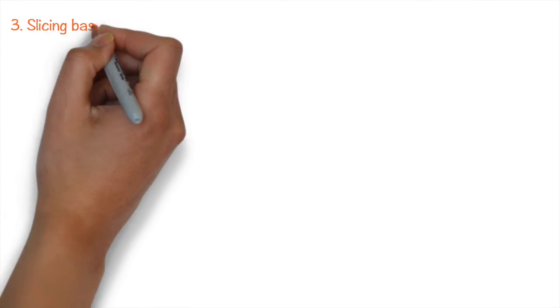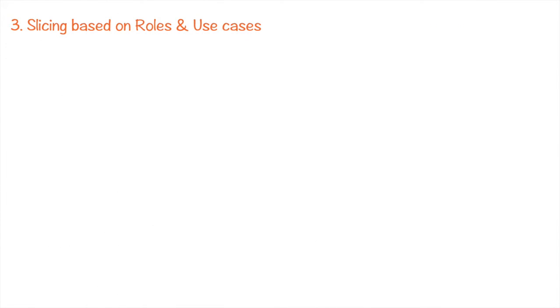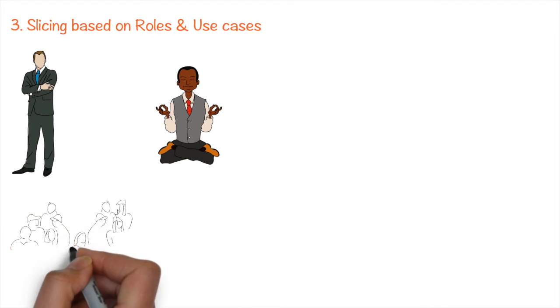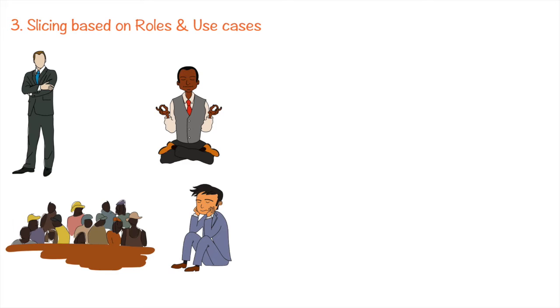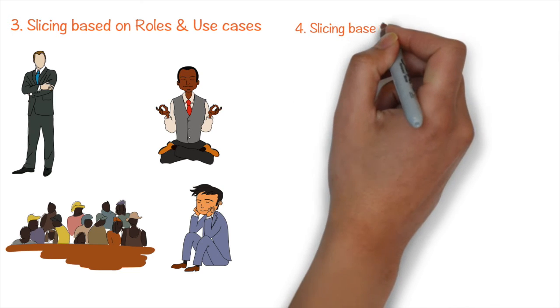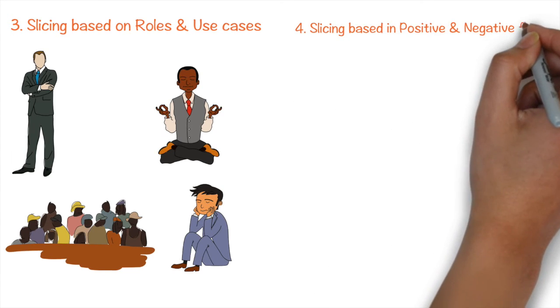Another approach is to identify different roles and the use cases for these roles to help slice the PBIs. Some of the use cases you may immediately implement, while some would be implemented in later sprints. For example, the roles using the Scrum tool could be PO, Scrum Master, Team, Customer Acceptance Test Engineer, Observer, etc. Each of them may operate the tool in different ways, have different CRUD operations, which will give you hints on deriving PBIs.